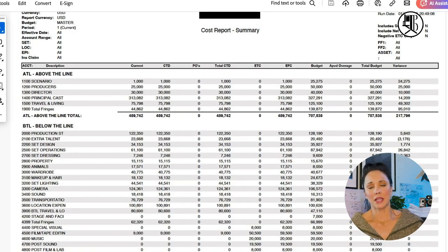I would tell my accountant, hey, I'm going to do a purchase order for this. Let's earmark those funds because we don't want that money spent. We know for a fact we need that. So they would plug a PO in here for $50,000. Then that amount, plus whatever the cost is, is reflected in this total cost to date. So it's earmarked and expensed right away, and that money can't be used for anything else.